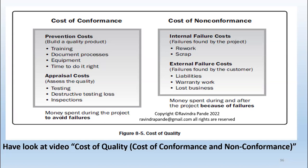There are also costs of non-conformance. When you run testing cycles, some bugs are found that must be rectified before delivery. All reworks are included, and even scrap — for example, if you are manufacturing a pen and some rework costs are beyond recovery, you scrap the product. The manufacturing cost of scrap product is included in the cost of quality. Then external failure costs like liabilities, warranty work, and lost business are also added — these are efforts spent during and after the project because of failures.